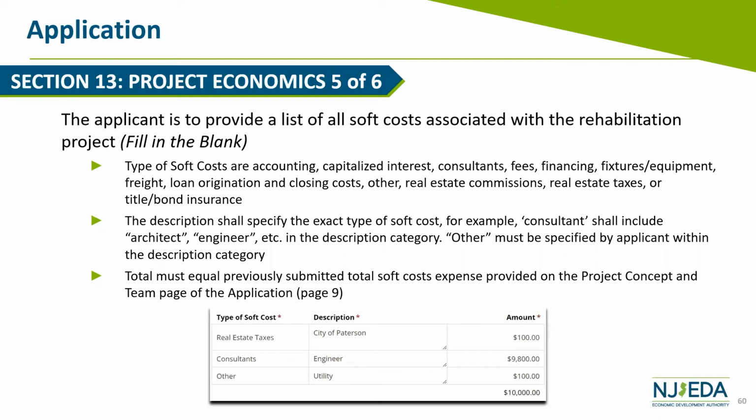So the description shall specify the exact type of soft cost. For example, if you're listing a consultant as a type of soft cost, you will need to specify in the description whether it's an architect or engineer. The same can be said for other. If you list other as a type of soft cost, we will need to know what that is defined by the description. And then of course the amount. It's very important. The amount listed here, the total, must be equal to the previously submitted soft cost amount that you list in the project concepts and team page. If you don't, you'll get a flag like we showed you before, but just something to keep an eye on. Next, please.